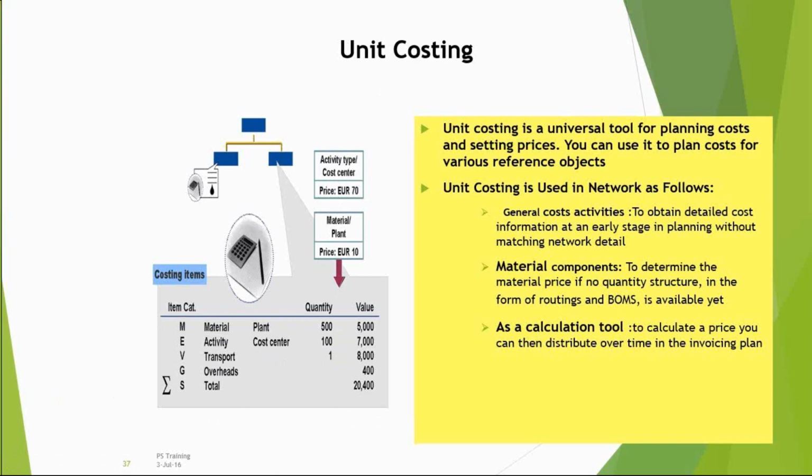Normally, in expenses, there are two types: one is direct expenses, another is indirect expenses. Direct expenses are the ones which have the units and the cost. The cost into units gives you the total value. Indirect expenses are the ones which we will not accumulate directly. Suppose the head office staff will not be working on a particular project, but their expenses have to be incurred. Your office maintenance, nowhere will it get any revenue, but it is an indirect expense for you, right?